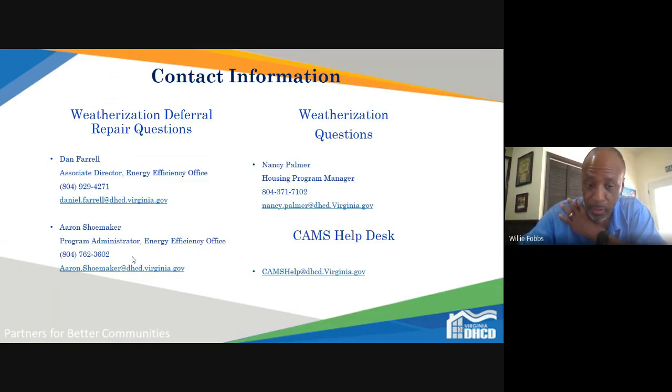And as Dan mentioned too, if you're going in with an estimate that you're going to finish 8 homes in that first year, and you only get 6 of them done, our intent is to allow you to carry that funding over into the next program year to pull in those other 2 or additional homes. So I want to be clear about how our intent is to allocate these funds to your individual agencies.